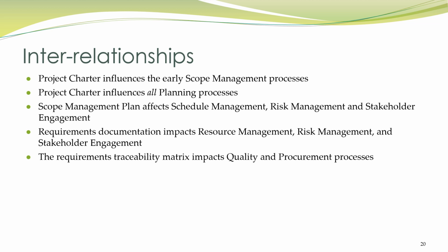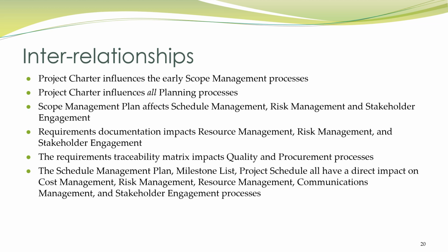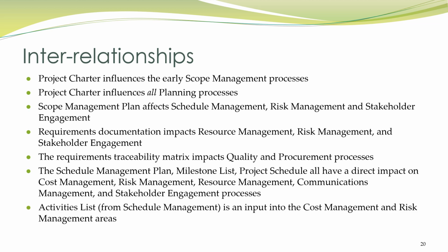The requirements traceability matrix impacts quality and procurement processes. The schedule management plan, the milestone list, and the project schedule all have a direct impact on cost, risk, resource, communications, and stakeholder engagement processes. The activities list from schedule management is an input into cost and risk areas.